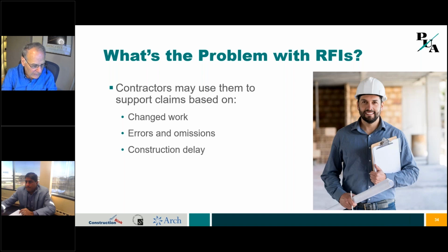It used to be everything was in writing and you had to put a number on them to keep track. Now everything's electronic, it's easier to follow. I like these project websites where I can go and say, hey, I'm looking at your project, just show me the whole database of all these RFIs and who's responsible. And if I see one that's too long without a reply, then I can say, well, where's this? What's happening here? This could turn into a claim, and we need to be aware of this. Okay, next slide.